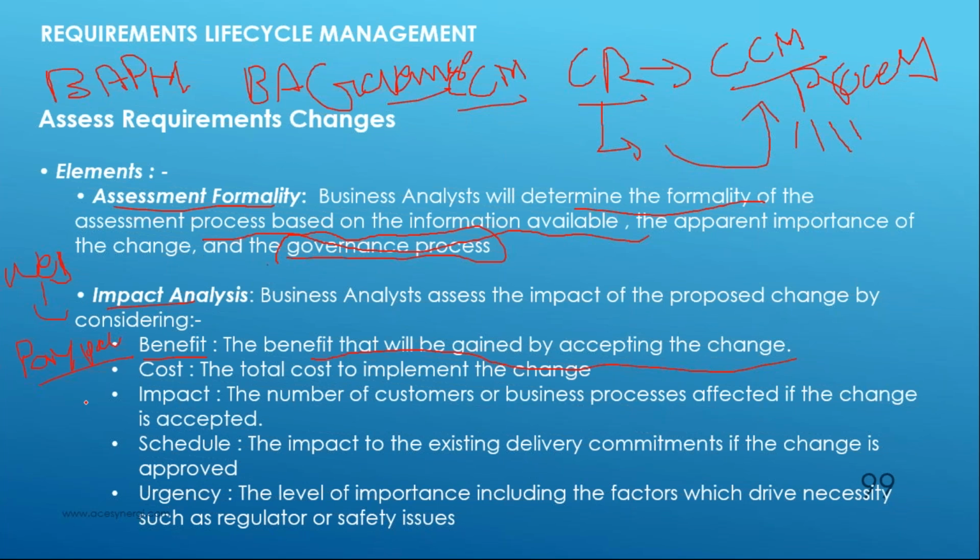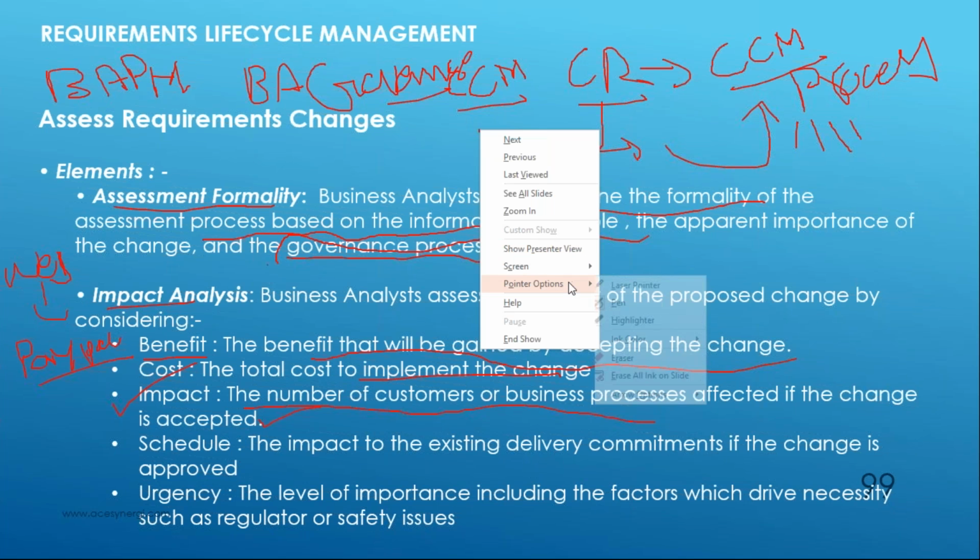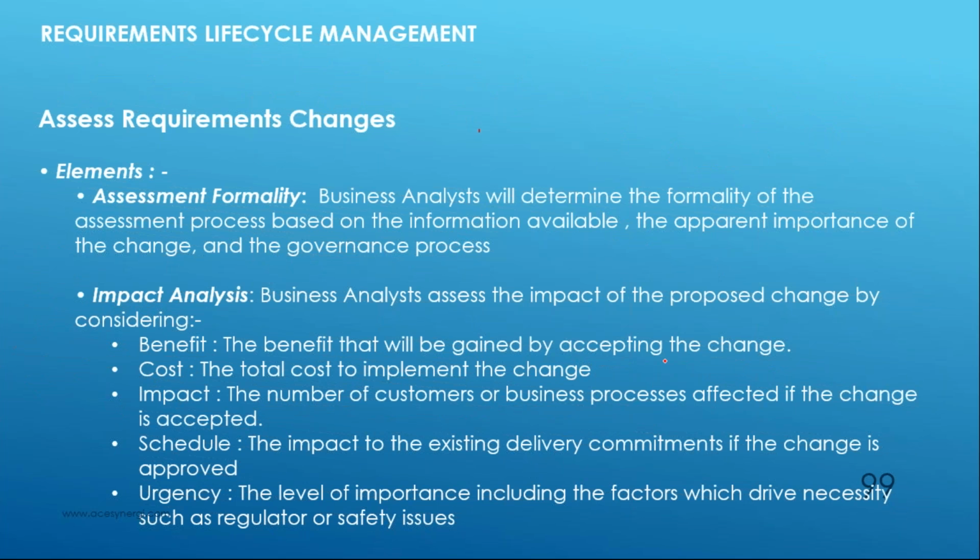The impact analysis can be done on various aspects, such as the cost factor. When I say cost, what will be the total cost to implement the change? And the impact is again the number of customers or business processes affected if the change is accepted. This is very important. You are not working in a silo. You don't work as an island. So every process is interconnected.